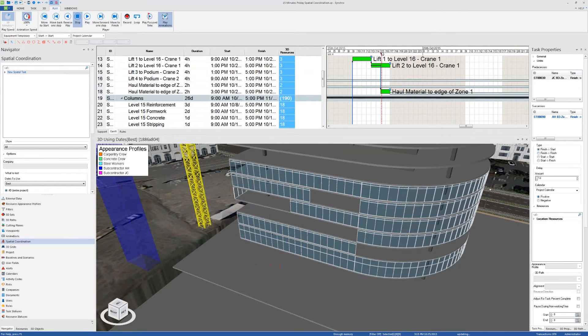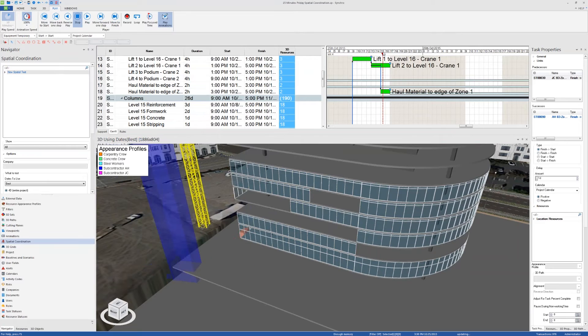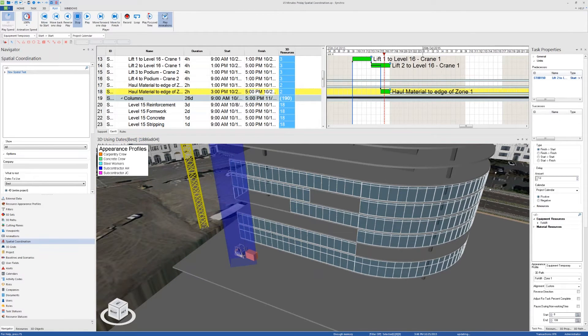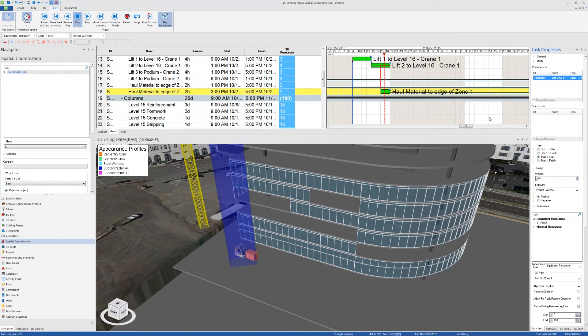Now I did that on purpose just to show that 3D paths can clash with each other. The way to fix this is I can go here and add a couple of hours of delay and then reschedule, and the clash will be gone.